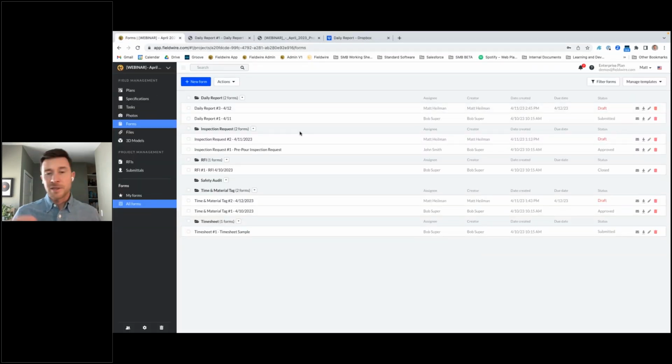And just think, maybe you've got a job that's a year, maybe a couple of years long, you're not going to remember what the weather was 6 to 8 months ago. Maybe there's a schedule delay and there's a little bit of finger pointing going into it. If you have these daily reports all stored in Fieldwire, you can pull up a specific day and reference what was done. Maybe there was a lot of rain or snow in the forecast that day. That's something you can use for that CYA aspect.